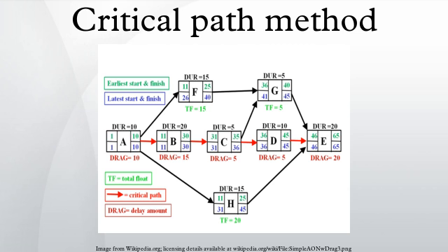Indeed, an important element of project post-mortem analysis is the as-built critical path, which analyzes the specific causes and impacts of changes between the planned schedule and eventual schedule as actually implemented.